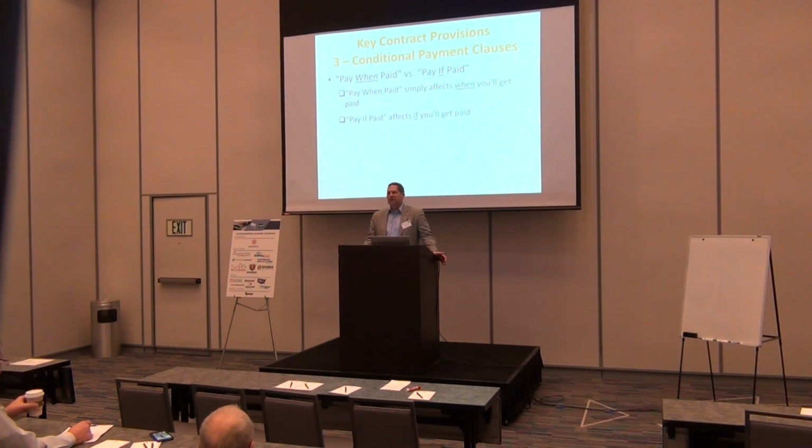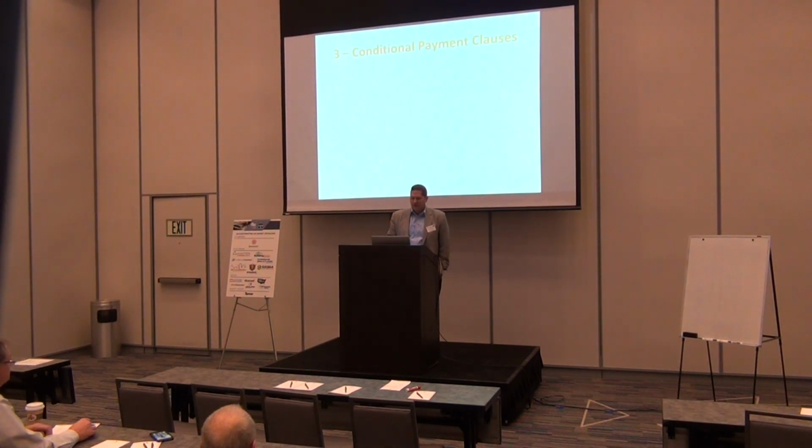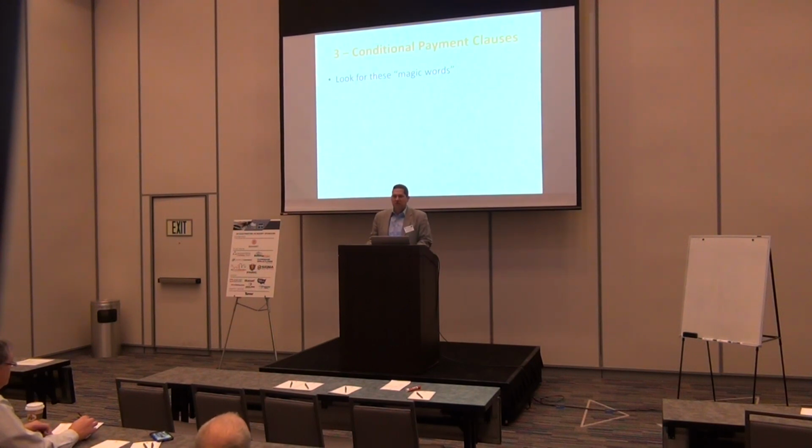The other provision, and as a subcontractor, you've got to look out for this and know what you're getting into, and that is a pay if paid clause. A pay if paid clause says if the owner doesn't pay, who's going to take it on the chin? And a pay if paid says the subcontractor is going to take that, not the general contractor. So here's what you want to look out for. If you're a subcontractor and you have this in your contract, you want to make sure you understand what it means, and if you feel like you need to negotiate that, you need to negotiate it.